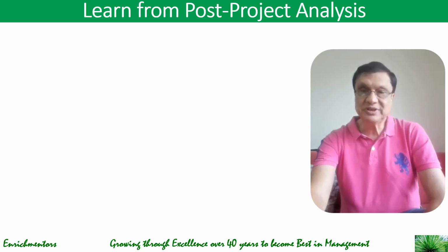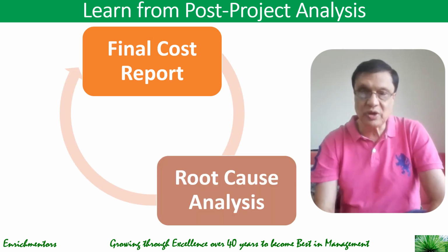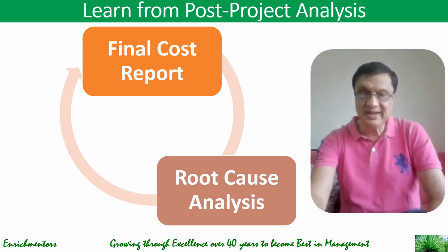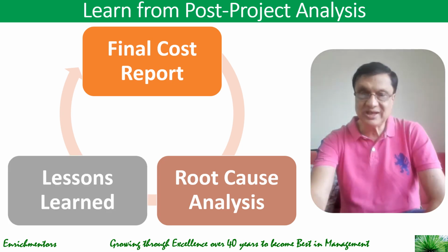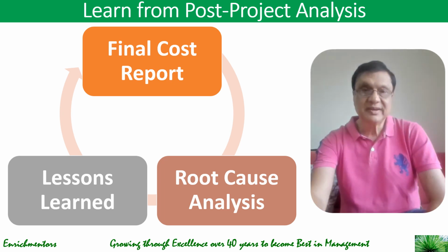Learn from post-project analysis. Now, there are a few things you can do here. One is to compare the actual versus planned cost to identify variances, then investigate reasons for cost overruns or savings and identify the root causes, and then learn the lessons. Document insights to improve financial planning in future projects.